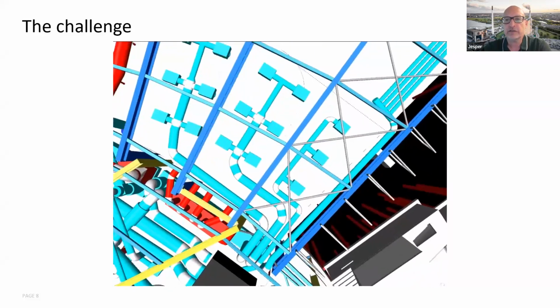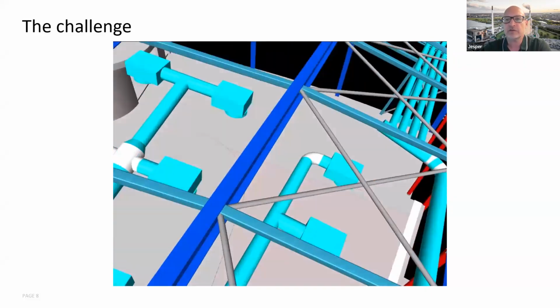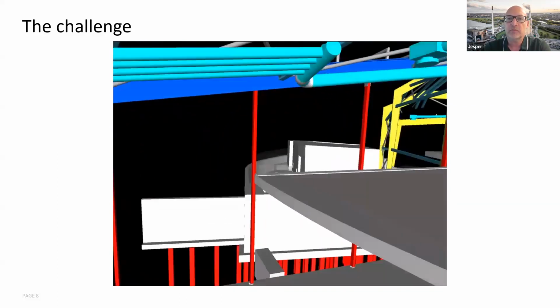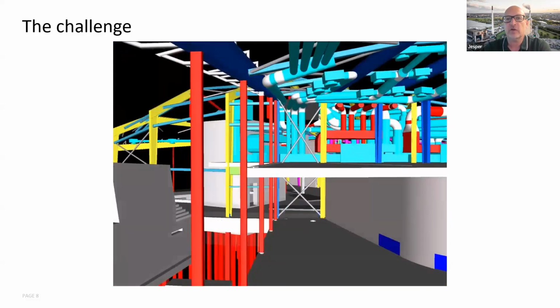So when the contractor looked at the duct, he mounted this duct as horizontal, but in the model you can easily see that it's not horizontal, the one in the top. So when the ceiling guys came in and had to put in the ceiling, well, the duct was in the way, so they had to do the whole thing over again.